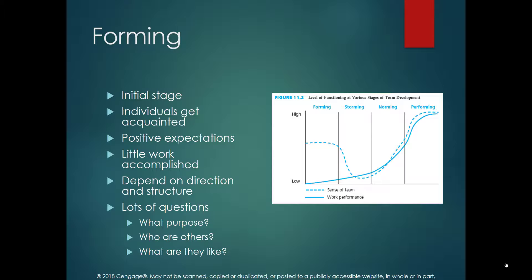Forming is the first or initial stage of team development, involving the transition from individuals to team members. We involve individuals whose expertise is needed for the project, and team members need to have a positive expectation at this stage. The main activity is thinking and planning the work, so the amount of actual work is very little. The project manager needs to provide direction and guidelines on how to accomplish the objectives, as people may have different understandings about the outcome.